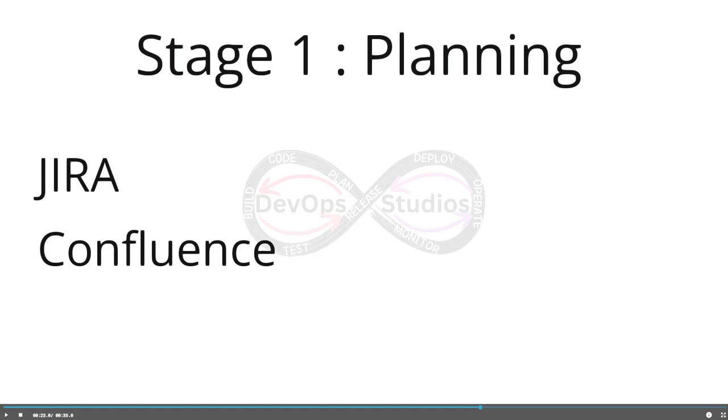The due date is going to be the end date, and we can plan sprints. We can add tasks to sprints using a backlog, and we can monitor the progress on the Scrum board or the Kanban boards. And also, when it comes to the tasks, we can track their progress by using visual boards, burn down charts, and reports to assess the project's progress.